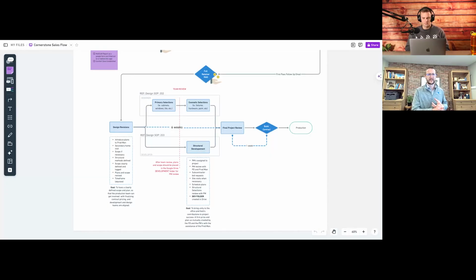We get ahead of planning, getting things to the county, getting subcontractor bid requests in, and really getting that estimate that the client's going to get for this contract down to what we call no surprises contract pricing. We're actually giving them something that's coined no surprises, because any surprises that could come up are in the general provisions as normal. Like, look, there may be some things that aren't supposed to be there that are there, like mold. If it's behind the walls, there's no way for us to know that at this point.